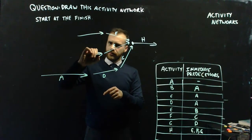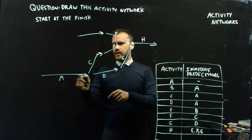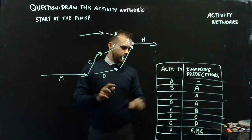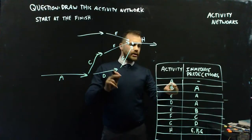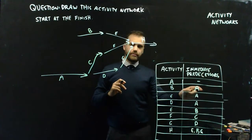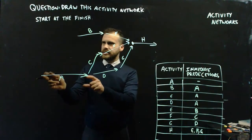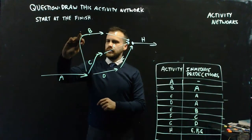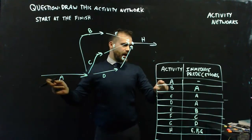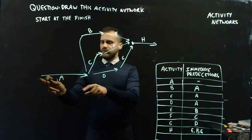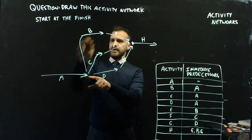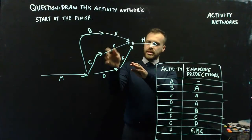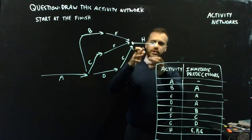Now A is an immediate predecessor of D and C. And B has an immediate predecessor of A as well. So A has to happen before B can happen. And A has no immediate predecessors. So first A happens, and then B, C, and D happen. And then from B, C, and D, E, F, and G can happen. And then from E, F, and G, we finish off by doing H.